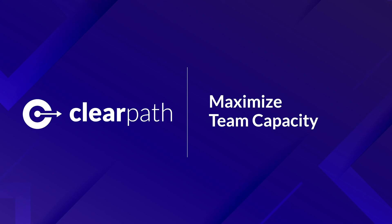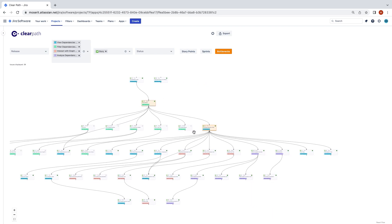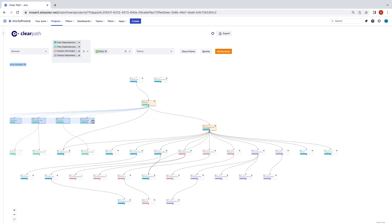The last way to manage schedule risk is to identify the bottleneck tickets in your plan. To meet your schedule, you want to enable parallelized work as much as possible. Tickets that block a large number of other work are a risk to preventing you from achieving your team's full capacity.